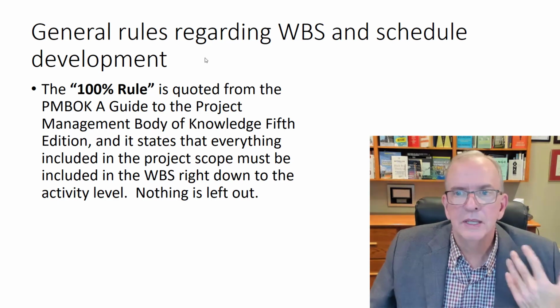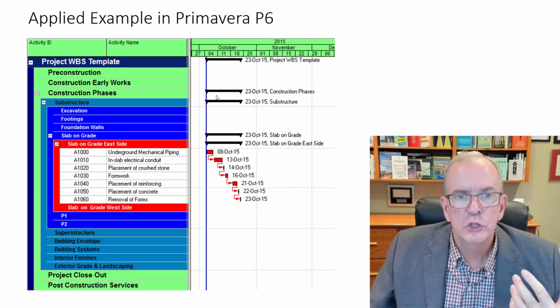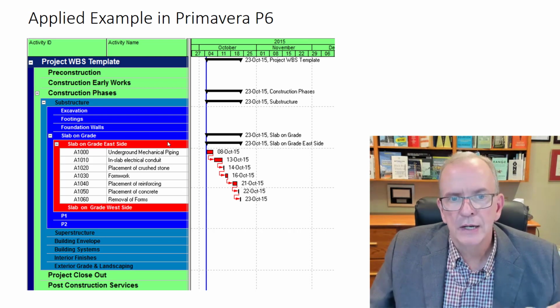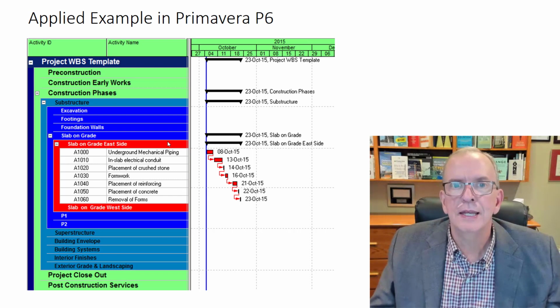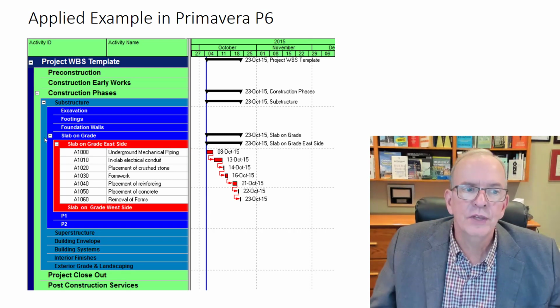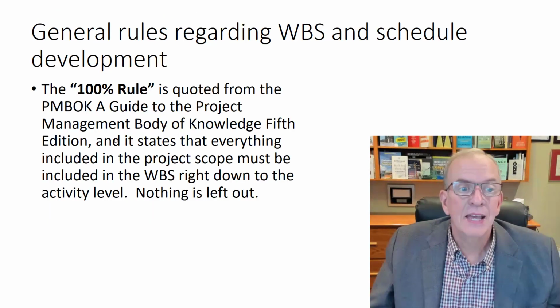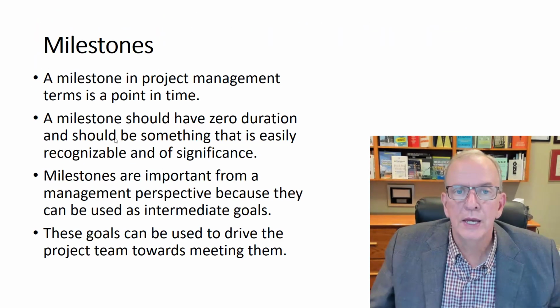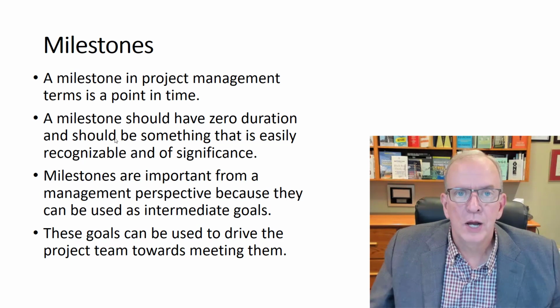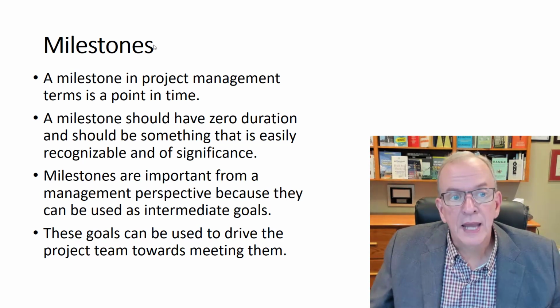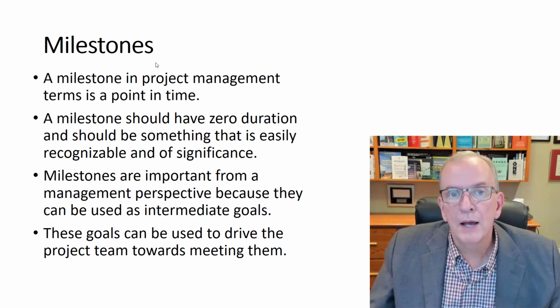And one of the things with the WBS is it's trying to help ensure that you have 100% of the project covered or encapsulated under that work breakdown structure. Nothing is worse than missing a whole area of work. And this can act as a checklist to help you ensure that you don't miss major elements of work.